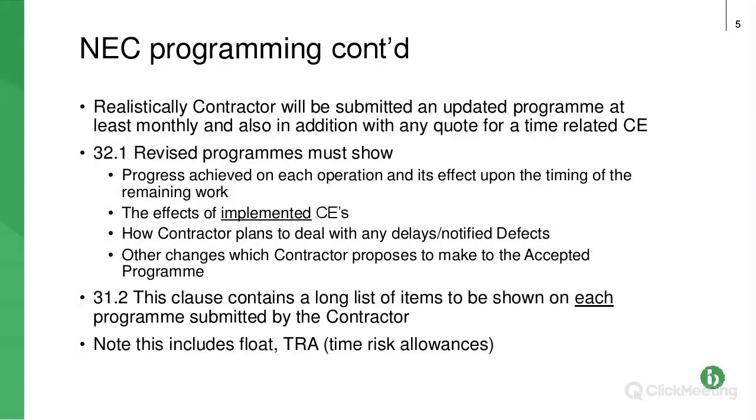And also, please note that a revised programme has to be submitted with any quote for a compensation event where you are saying that an extension of time, that additional time is required because of that compensation event. So please don't forget about that. That's a key area where a revised programme is required to show the additional time required. And of course, hopefully, again, you can see why it's critical that you have a base accepted programme at the start of the project, so that if you have any compensation events, you can incorporate them into that programme.